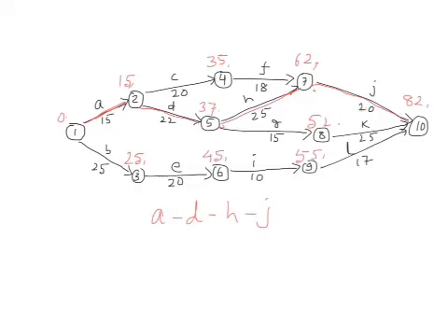project completion time. Once again, it is not necessary that whatever reduction we do on the activity time of critical activities will be reflected in a reduction of project completion time. That is not necessary because other activities or other paths are also there. So if the reduction in critical activity time reduces the time of that path below the time of any other path, then the other path becomes critical. So in that case, the full reduction will not be reflected in the project completion time.